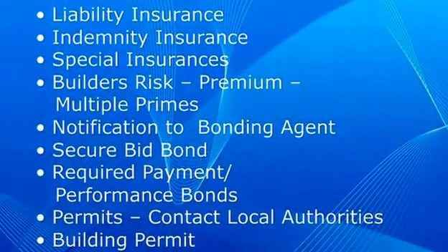Indemnity insurance is very similar to that. The front end that we talked about, traditionally the owners will require you to indemnify them. General contractors require their subcontractors to indemnify them. It's a flow down or flow through effect. You need to make sure that you have the costs to be able to provide those indemnifications included in that estimate.